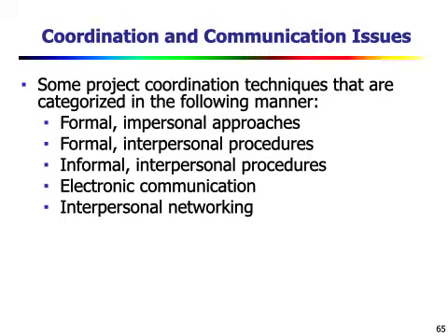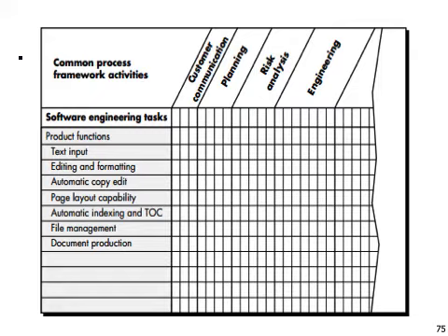So the job of the project manager is to estimate the resource requirements of each of these matrix cells. That is, for the product function text input, you need to estimate the resource requirements for each of the framework activities.